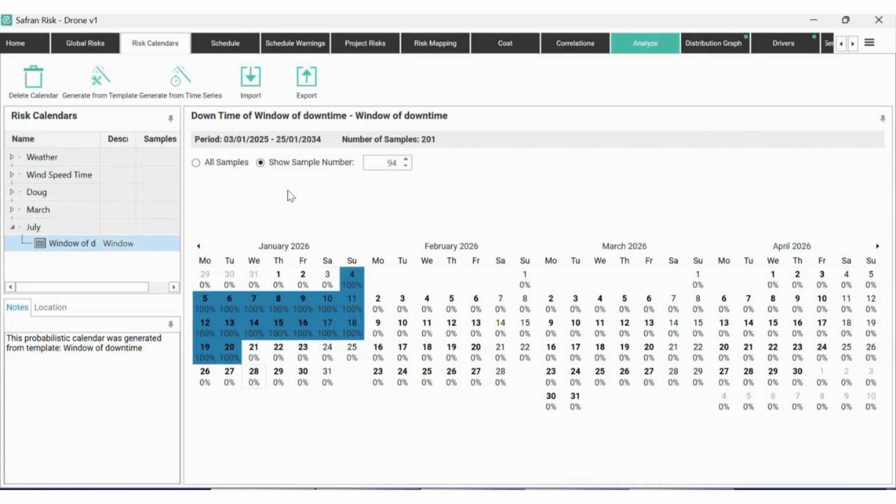But essentially, this is exactly the same kind of example. Fortunately, for those of you who are based in the UK and are familiar with Blue Peter, here's one I prepared earlier. So what we've got here is a calendar where we've got some uncertainty around the start date, and some uncertainty around the end date, and so that block of downtime itself is uncertain. We're not sure exactly when the canal is going to freeze over. We're not exactly sure when it's going to defrost again, and so the amount of downtime that is going to be applied for that is going to be uncertain as well.